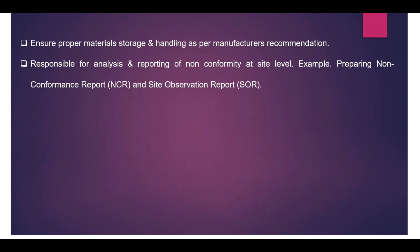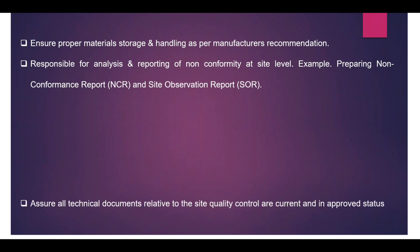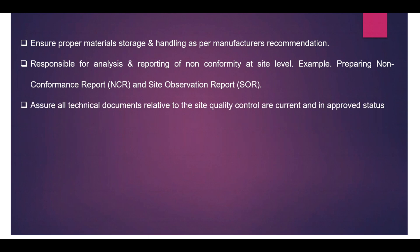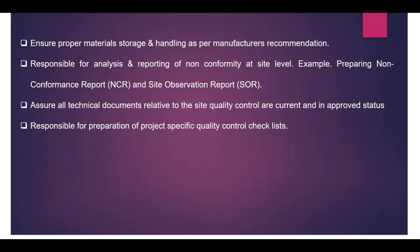If an activity is completely deviating from contract documents, raise an NCR; if there is a minor observation, raise a site observation report. Additionally, ensure all technical documents related to site quality control are current and in approved status. For drawings, there may be multiple revisions (e.g., Revision A, B, C or Revision 1, 2, 3), so as a quality engineer you must ensure that site engineers are executing work against the most recent approved revision to avoid rework.